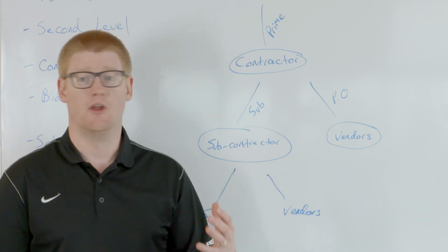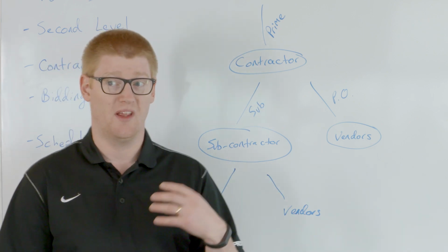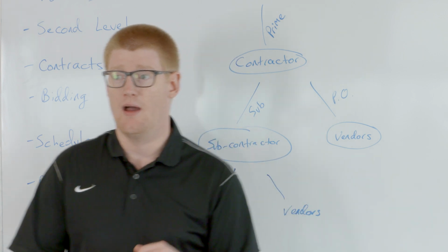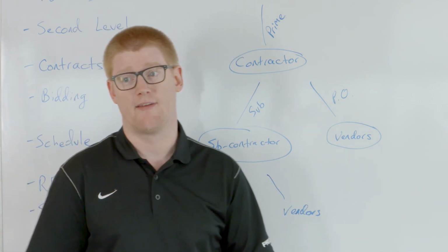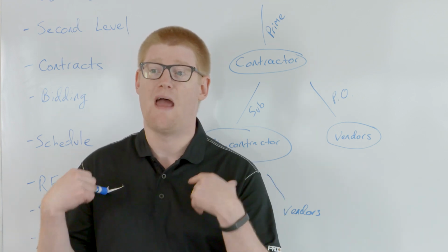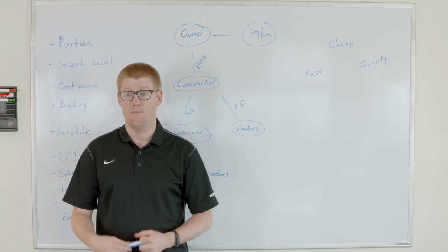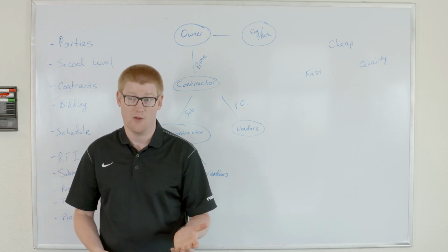The more industrial you get, the faster you want that project done, and the more you're willing to pay to accelerate that. If I'm building an ethanol plant, I can start making money as soon as that ethanol plant is done and operational. And the money that I'd be pulling in from having the plant operational may be more than the cost of having a contractor work 24/7 in order to build the building.